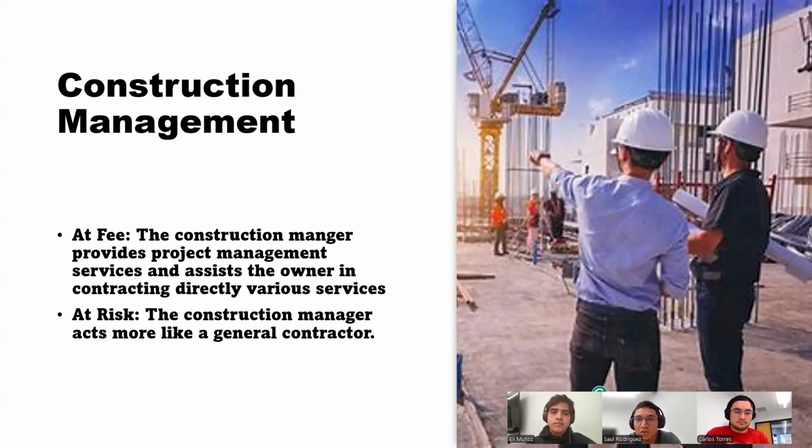And the at-risk method of construction management is when a general contractor takes on a greater responsibility for construction quality and for the schedule and the cost, just being on top of everything and making sure that the project is where it has to be.